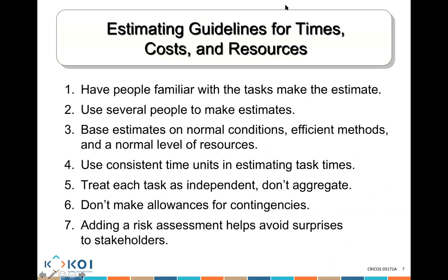So what do we do to be able to get proper estimates? Well, there are some recommended guidelines. One, if you're going to get someone to estimate a task, employ someone who's familiar with that task. For example, if I want someone to estimate how much this garden project is going to cost me, I can't employ a painter and say, estimate this garden for me, because the painter doesn't know anything about the garden.